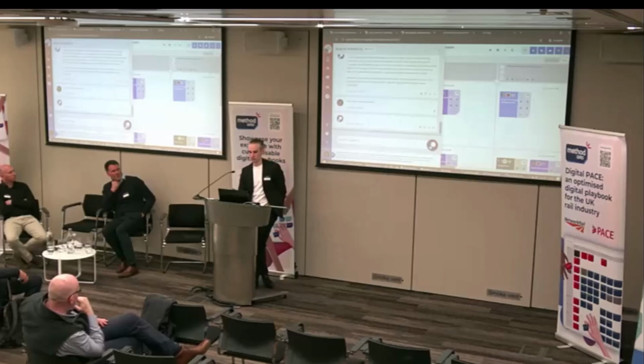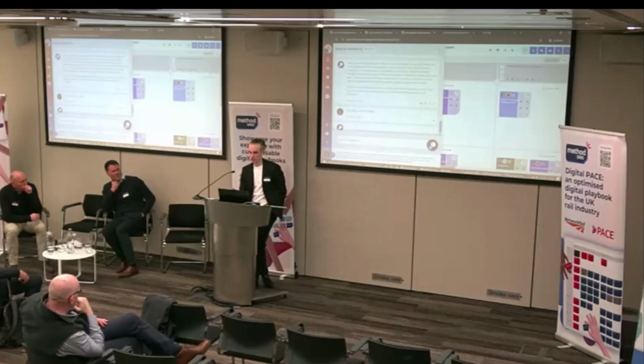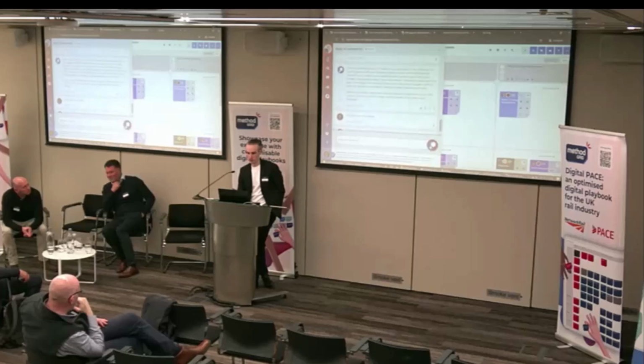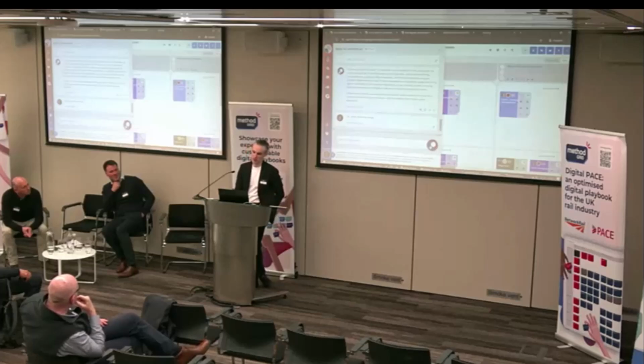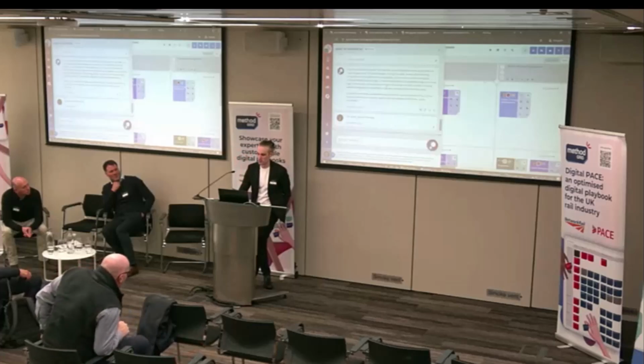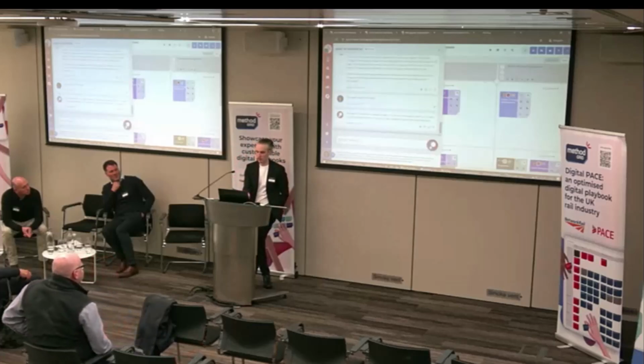Yeah, so you can see it's happy now with how much detail I've given it. So it's distilled this to: project managers conduct an early review of existing infrastructure conditions and compatibility with new systems during the strategic development phase. If there are any potential compatibility issues due to the age or technology of the existing infrastructure, they consider involving electrical specialists immediately to devise a phased implementation plan. So you can see there's a lot more detail, and it's a lot more actionable than what I initially said of just the incompatibilities. So you can see that's the idea, and then it's asked me if I wanted to save it, so I've said, yes, save that please.